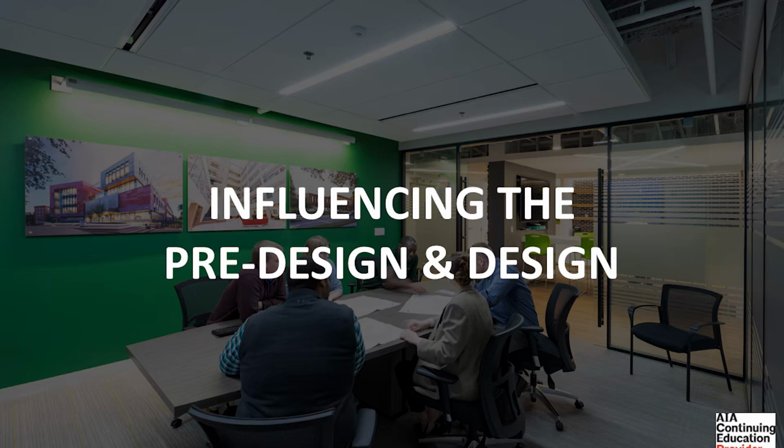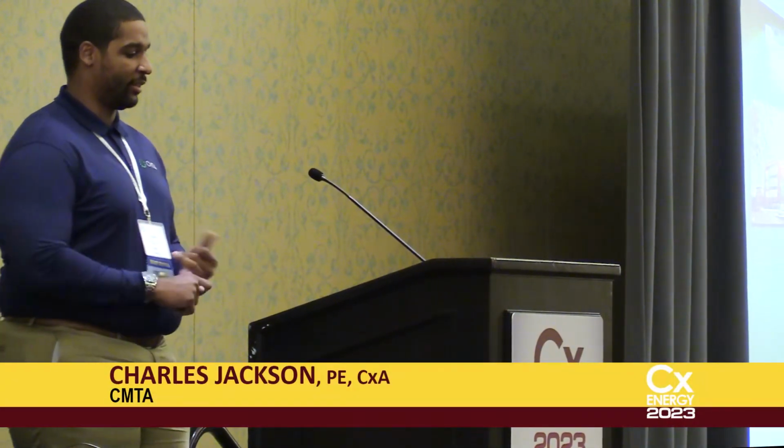So a lot of these problems, unfortunately, as a commissioning provider, a lot of times we're just diagnosing it, and once we test, we're reporting what we found. But a lot of the opportunities to make the biggest change is influencing the pre-design and design. You know, we kind of believe that first 30% of designs is where you can make the biggest impact and the biggest change for your building.